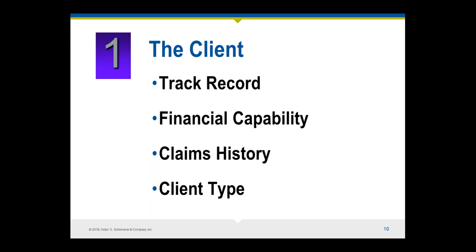You also want to think about what type of client you're dealing with, because each type might result in a different risk management response. First, is it a sophisticated client or a naive client? A sophisticated client — like a big-time developer who's done lots of projects — may be trying to transfer all of their risk and responsibility onto the design team and contractors, so you need to review those contracts carefully. On the other hand, a naive client, like a husband and wife who have never hired a design professional before building their ideal home, will need a lot more hand-holding and explanation of what's to be expected, what you can do and what you can't do.